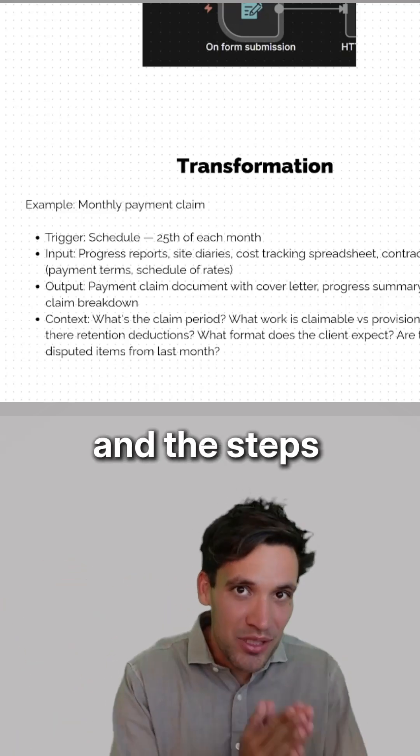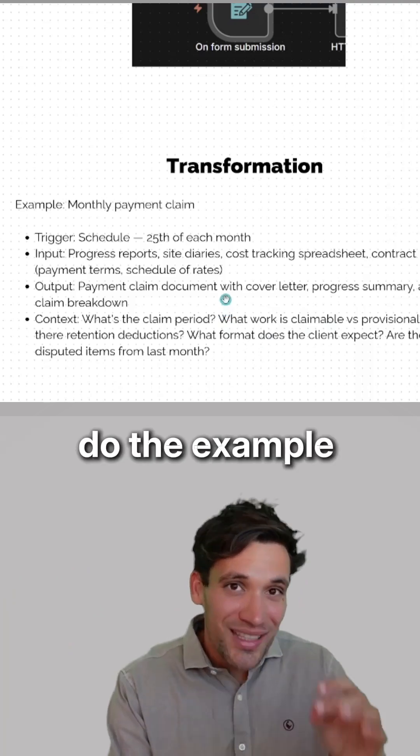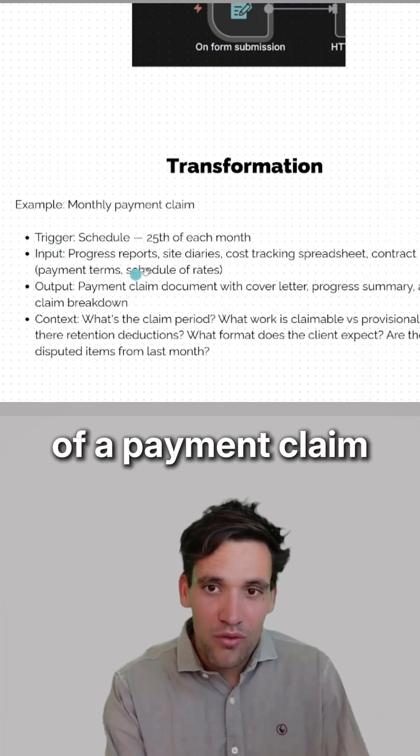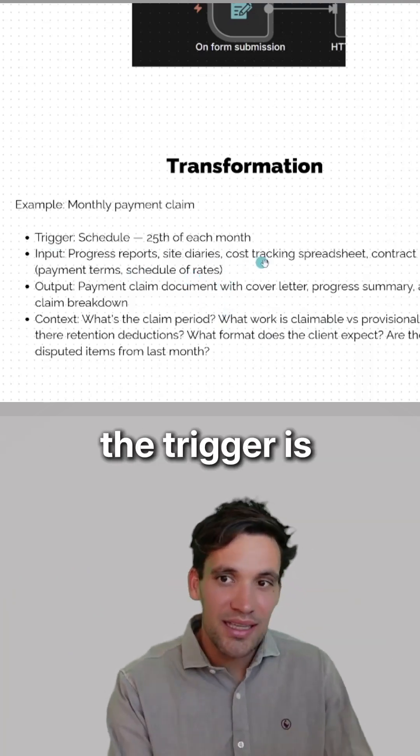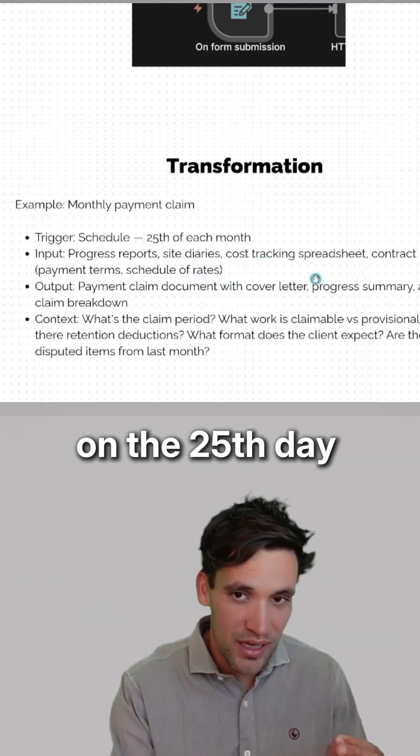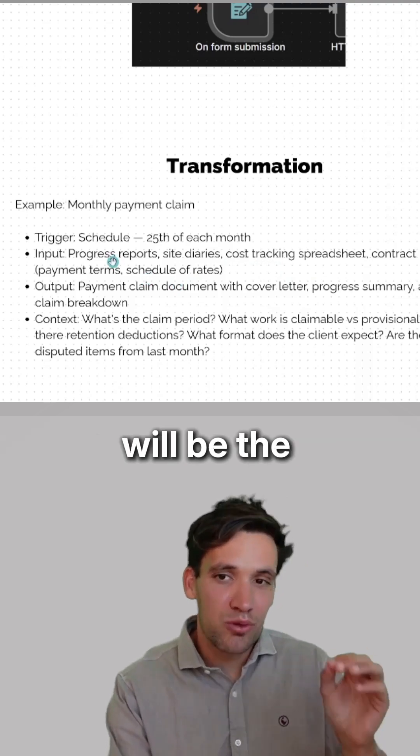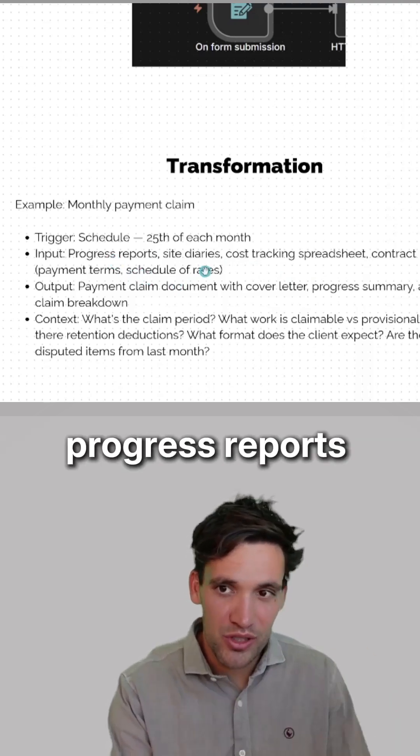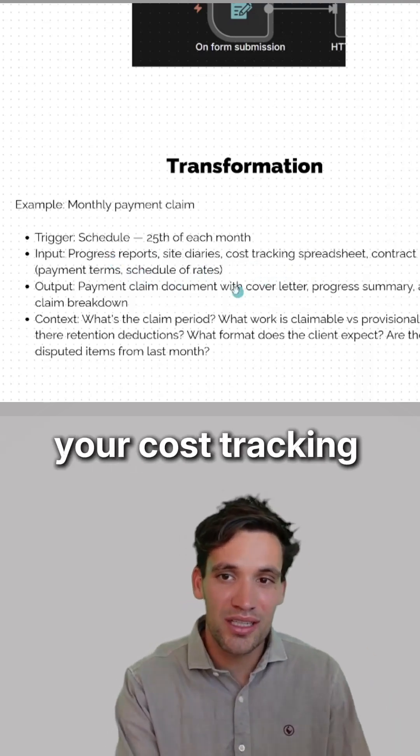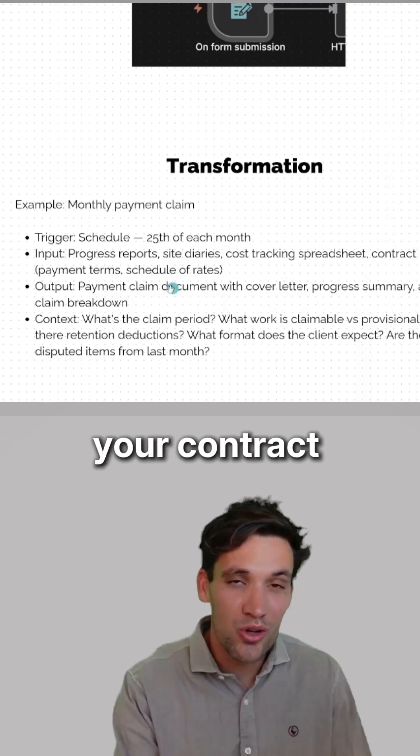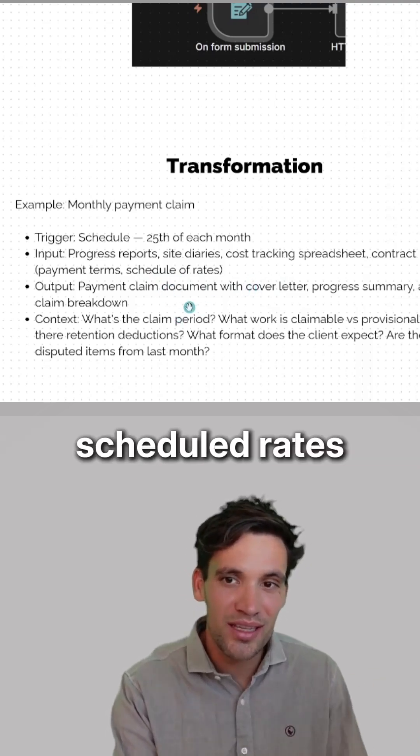If we take the example of a payment claim, the trigger is on the 25th day of each month. The input will be the progress reports from site, the site diaries, your cost tracking spreadsheet, your contract payment terms, and scheduled rates.